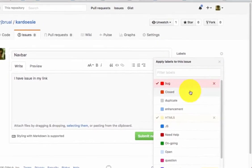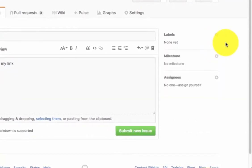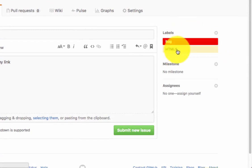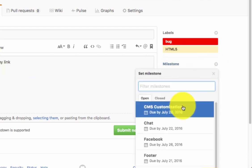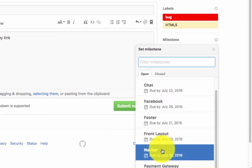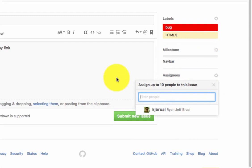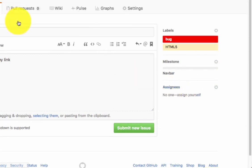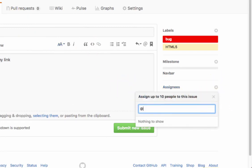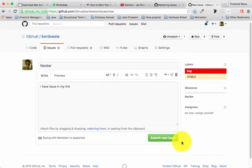After clicking bug and html and closing the label menu, you'll see the labels 'bug' and 'html' appear on the issue. For the milestone, this issue is under 'navbar' so I select it. You can see the progress for every milestone. If you have a group you can assign members - you put '@' and then the GitHub username of the person.